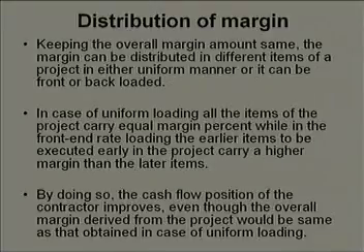Now normally back end loading is performed in a market situation when there is a lot of inflation. Inflation is very high. So by doing so, you will find that contractors try to earn more money through escalation.